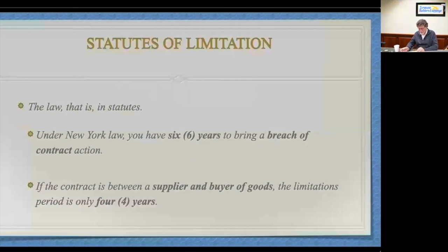You need to know about statutes of limitation, okay? Because these are really important. In New York State, if somebody doesn't pay you, that's a breach of contract. The time that you have to bring a lawsuit for breach of contract is 6 years. If you are a supplier, it could be four. Okay. 6 years is a long time, let's face it.